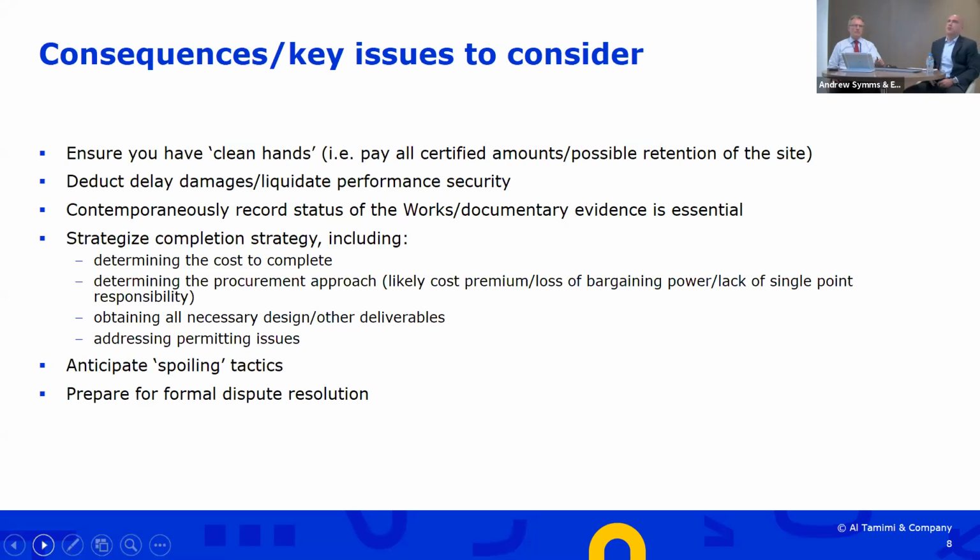And if you get into these kinds of arguments, it'd be quite easy for the contractor to allege that the termination is invalid and therefore wrongful. So I think it's very important that all certified payments have been made prior to a contract being terminated. An add-on point to note as well is, if you're an employer and you do terminate a contract, and there are outstanding payments due to the contractor, there's a chance that the contractor may seek to retain possession of the site until its entitlements have been discharged. And that can cause a lot of complication. It's a very complicated issue, which could be a topic for another webinar.